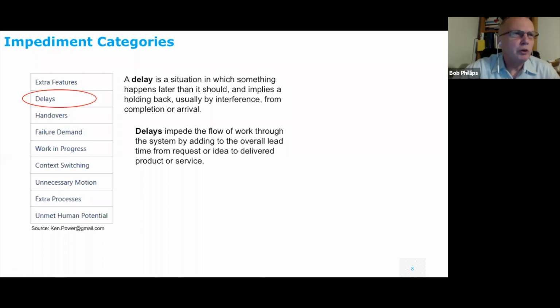If one of your team members needed a database set up, all right? And again, if you have a Scrum team, the team's supposed to be able to do everything, but that's not always reality. You might need an external DBA to actually do this work. So here you have the potential for a delay, because DBAs are always being pulled on. You want to understand that, and have those conversations with the DBA before the sprint even starts, as you're planning that particular work item. That way you can avoid the delay, so that the DBA will be available and will make that database available for development.